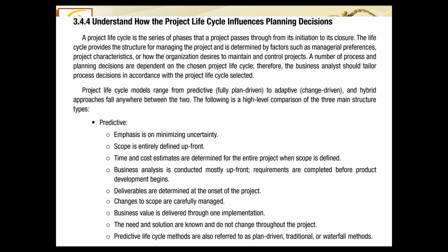So this is very, very clear. Requirements are already known. Deliverables are determined at the onset of the project. Changes to scope are carefully managed. Business value is delivered through one implementation. The need and solution are known and do not change throughout the project.